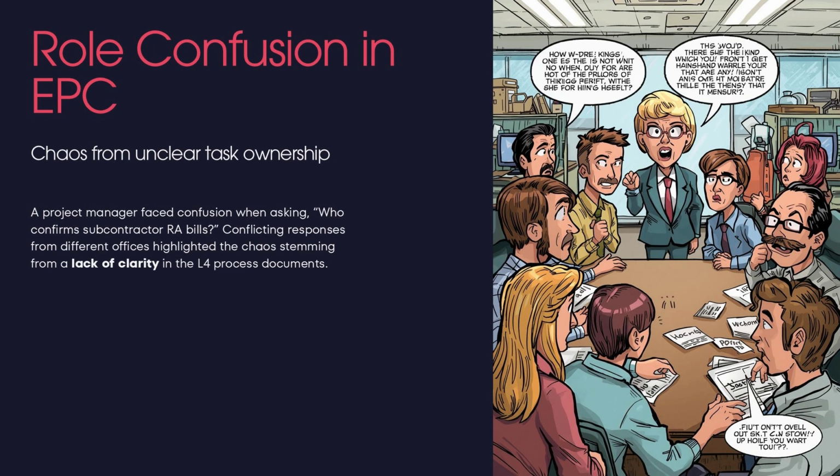Now let us understand how to prepare a RACI matrix, that is the heart of clarity. RACI is where EPC companies suddenly become efficient. The formula is simple. List the key steps. Assign the RACI, that is responsibility, accountability, consult and inform. That resolves the conflicts.